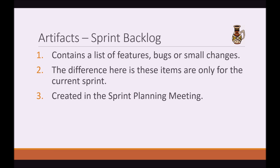The sprint backlog contains a list of features, bugs, and small changes as well, but the main difference is these items are only for the current sprint. This sprint backlog is created in the sprint planning meeting.